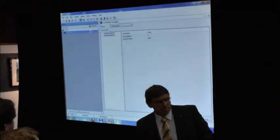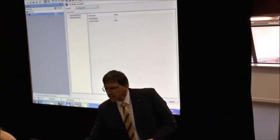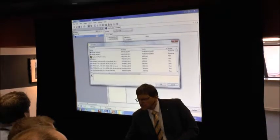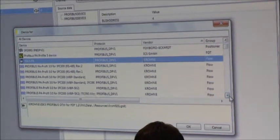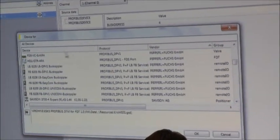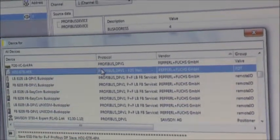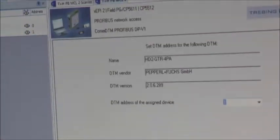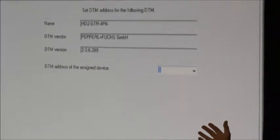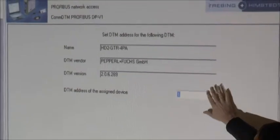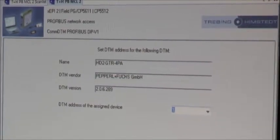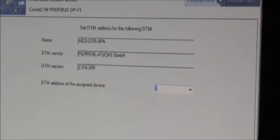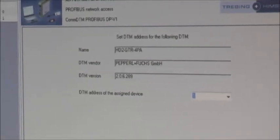So in the next step, we have to add the segment coupler from the hardware. So you get a list. Select. This is our model number. It is special. And this means this is a Profibus gateway, it is a segment coupler. I add it. And now I asked for the address. This is why I need to know the address. The address is 3.